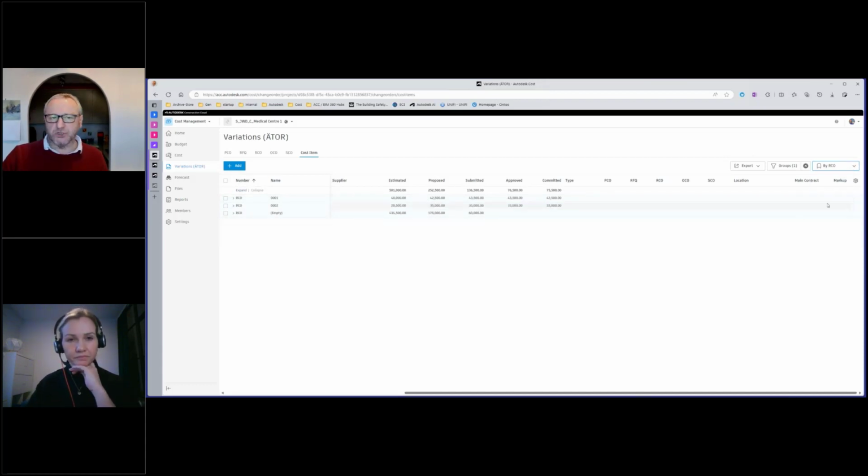By request for change order, so very often, certainly in the UK, we'll have a number of potential change orders. We'll maybe go out and get some pricing on those, and then what we would typically do is pick 4 or 5 of those potential variations, and we bundle them into one request for change order to the owner. And often that's specified by the owner, by the client. Any potential changes, potential variations, apologies, please just submit 1 per month. So the system allows us to do that.